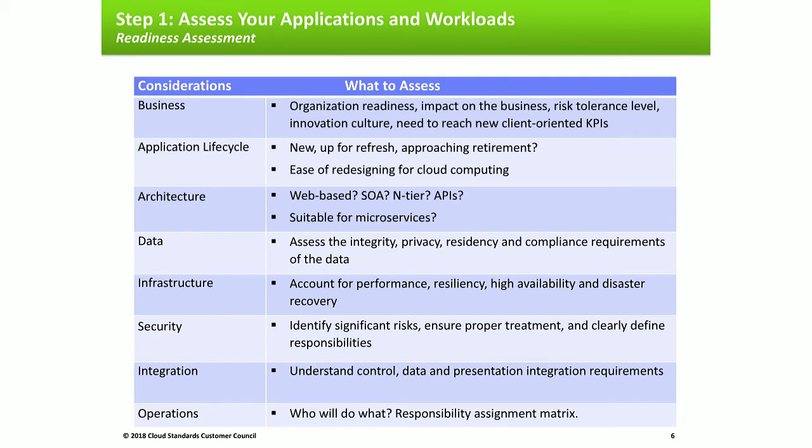So some of the best practices which are recommended in this particular paper are that you need to basically identify the applications and map them to the business components. And certain criteria become very important, like, say, for example, you all know it, but just to reiterate, the complexity of the architecture, the impact to the business, the transactional dependencies, the sensitivity of the data that resides within the application, and leveraging the cloud's inherent advantages such as elasticity. And of course, we also have to consider the benefit which comes from ending legacy support. So those are a few of the things which are very important criteria while looking at the applications.